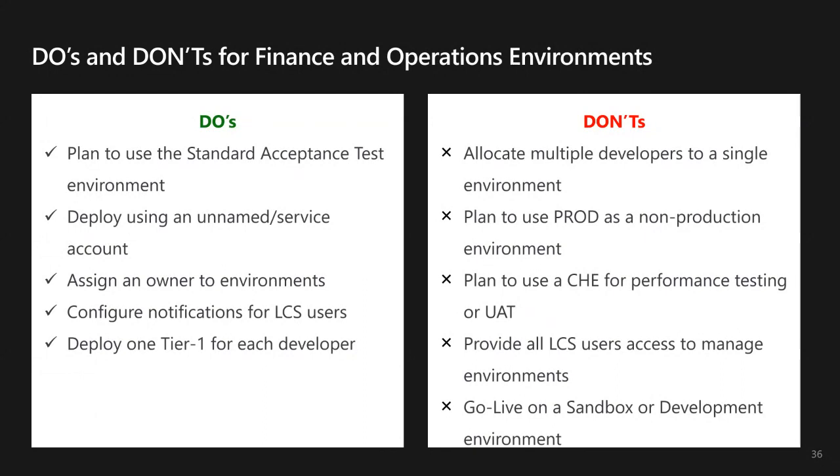We do require that you complete a performance test before you can even request your production environment. Also, do not plan to use a cloud-hosted environment for your performance testing or your UAT. You'll want to make sure that you're using a Microsoft hosted environment, and you'll need to consider the size, the tier of that. And Peter talked a little bit about that earlier in the presentation on how to pick the right size of environment that's going to be needed based on your specific needs.